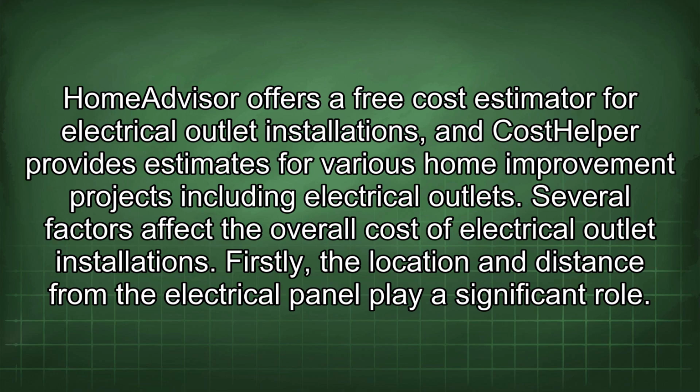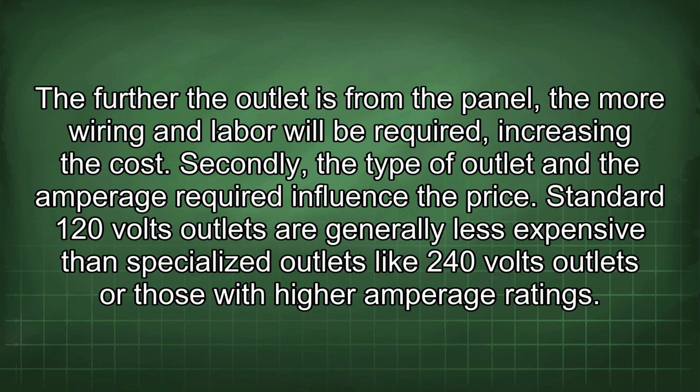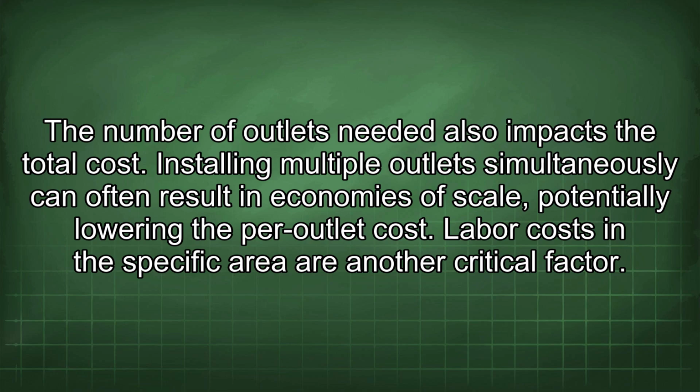Firstly, the location and distance from the electrical panel play a significant role. The further the outlet is from the panel, the more wiring and labor will be required, increasing the cost. Secondly, the type of outlet and the amperage required influence the price. Standard 120 volts outlets are generally less expensive than specialized outlets like 240 volts outlets or those with higher amperage ratings. The number of outlets needed also impacts the total cost.